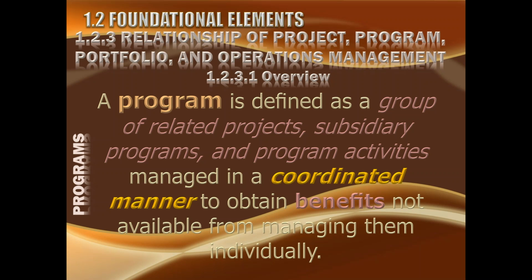So there has to be some operational activity which is called the program activity, which will actually be taking care of the product of the projects and taking it on. If a project was to construct a school, then running that school would be the responsibility of the program activities. And then construction of a university and running that university would be the job of the program activity. So these projects, sub-programs or program activities put together, these are called the various components of the program.